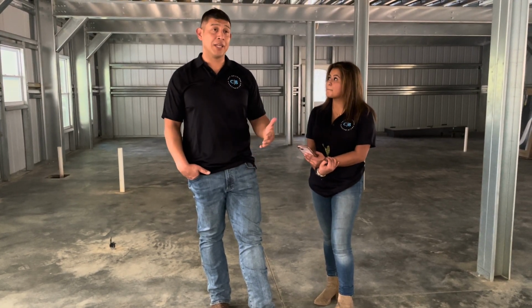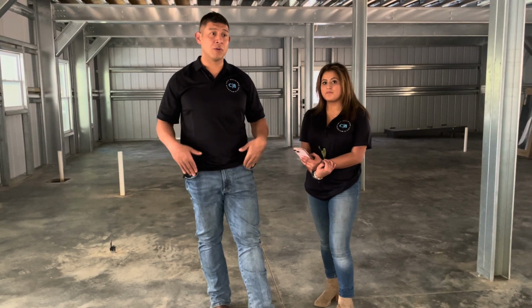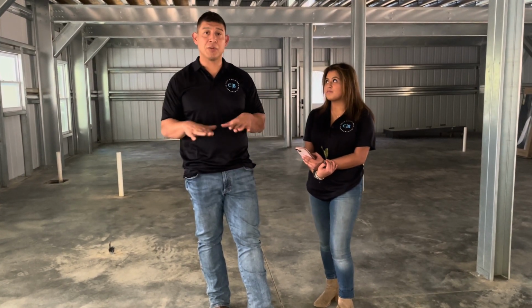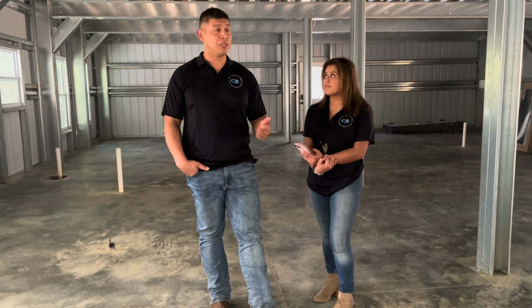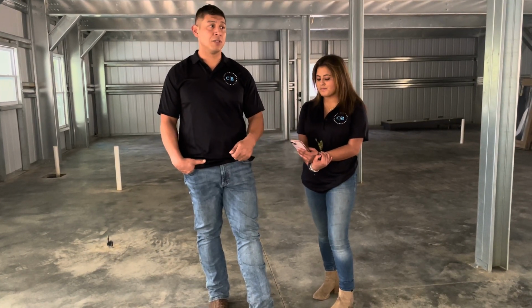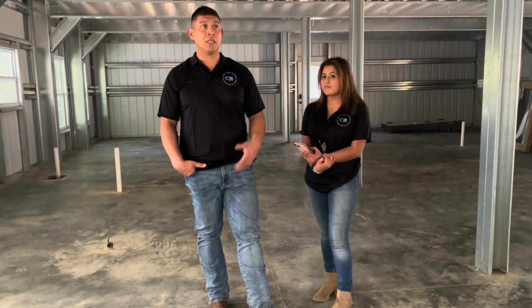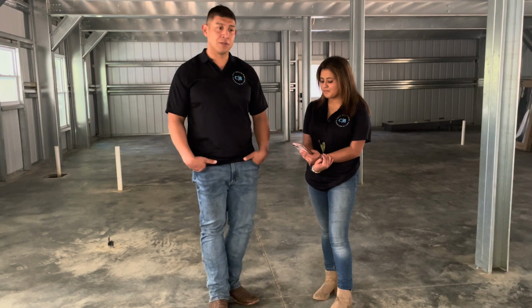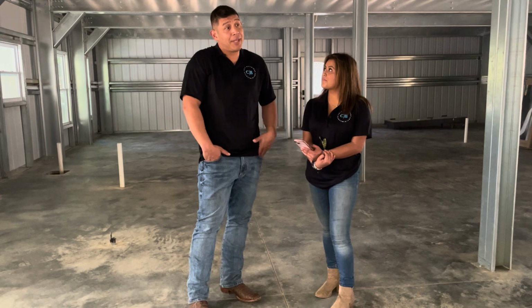Speaking of plans, after your budget you need to get into design, because your budget and your plans are the driving force that tell everybody what's going on. Plans are your second step, because the people that need to see your plans are the bank, which won't give you a loan without plans, and the general contractor, because we're going to do an estimate and we can't estimate something without plans. The subcontractors bidding out the electrical, the plumbing, the HVAC, and the concrete have to have plans too.